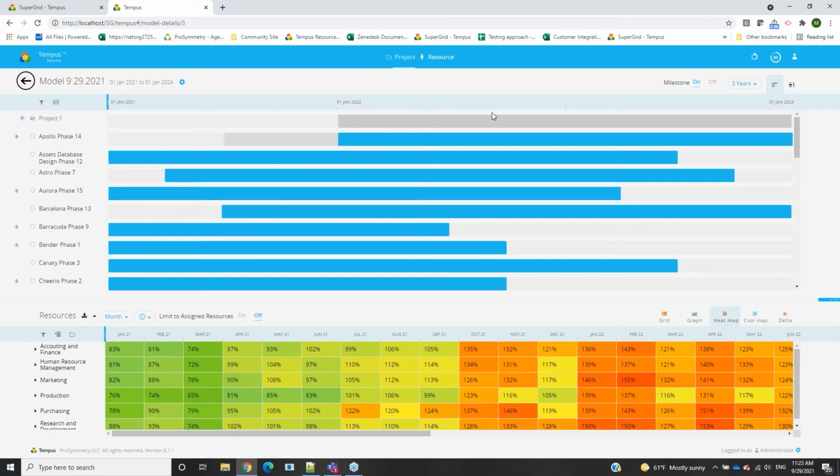Or maybe you had a project that you previously proposed to start on January 1st, 2022, and then it needs to be prioritized and started early. You can do the same thing by dragging the Gantt bar over to the left. And as you do so, you can see that we have this modal window showing you what the new from and to date will be, and how many days it's being shifted. A negative is going to be if you're moving backwards, positive is going to be moving forwards, and you can simply drag and drop it into the new start date and then make that change.